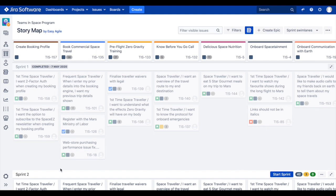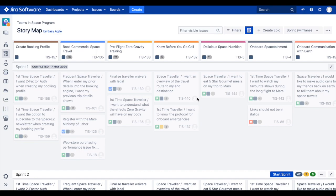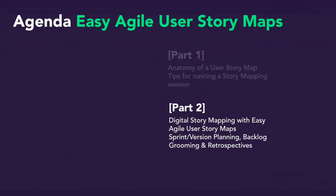Navigating back to the story map, we can see our last completed sprint sitting at the top of our story map in a read-only view. Having this view allows us to reflect on what we were able to achieve in our previous sprint by providing a glimpse of the state of our sprint when it was completed. In this example, we can see most of our work was in a to-do or in-progress status, which would provide a talking point to kick off our retrospective and potentially address issues of scope creep, over-commitment, estimation, and the size of work taken into the sprint.